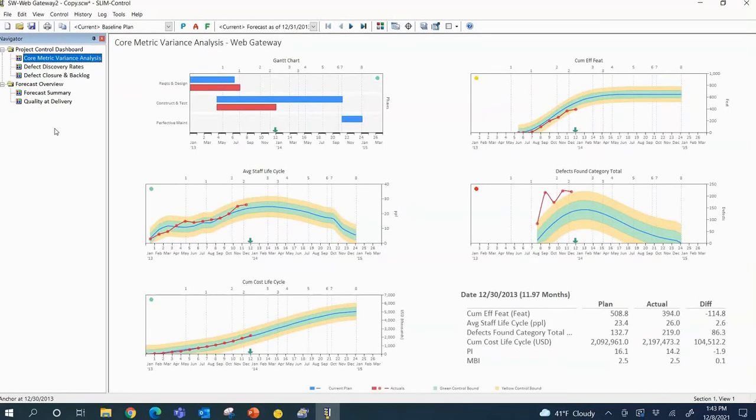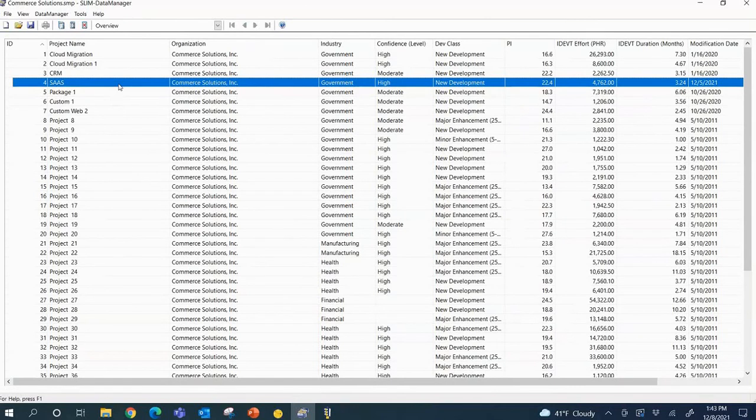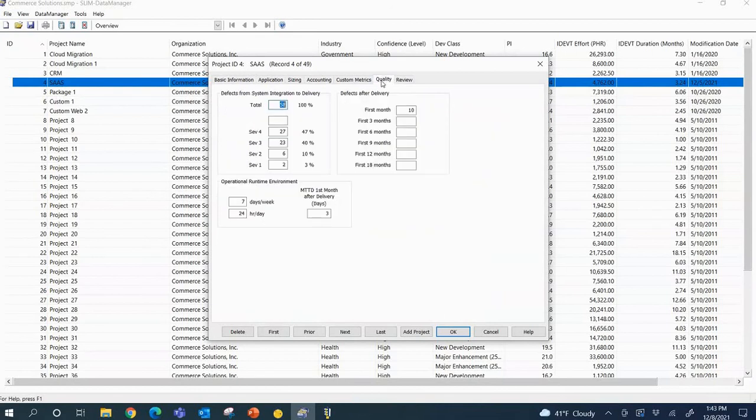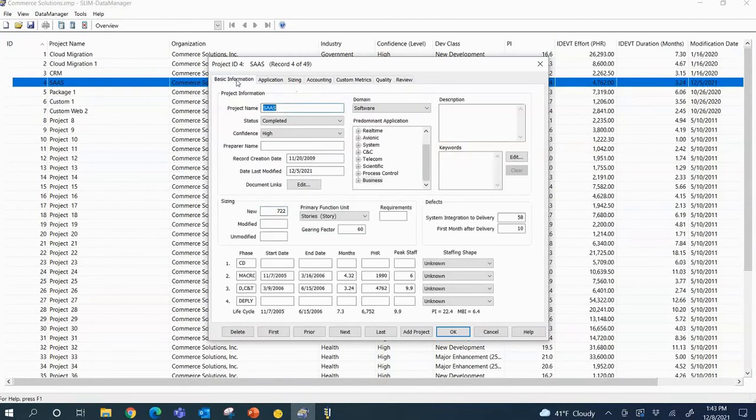Now, once the project is completed, all of that information can go back into that data manager where we started, right? Where we capture how much work was delivered, how much time and effort was spent, so we can calculate that productivity index for the next time. We can capture all of our reliability estimation for the next time, so that we can use it when we're making early decisions and also ongoing throughout the project when the project's in flight. We can use this information to validate and negotiate with the client.